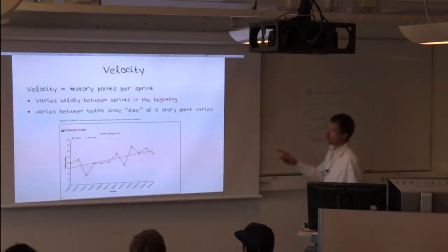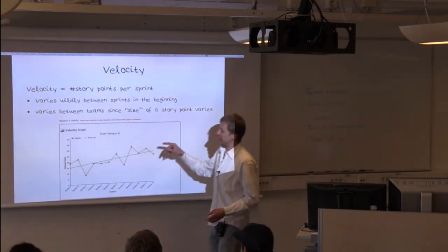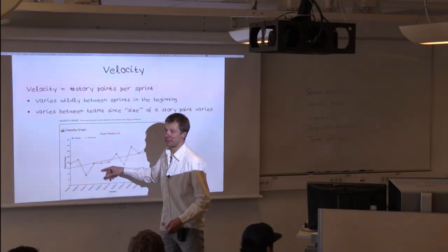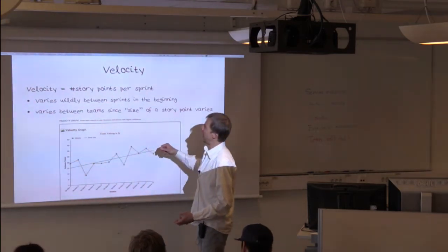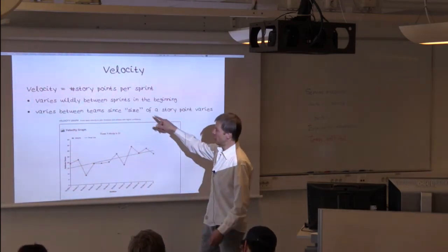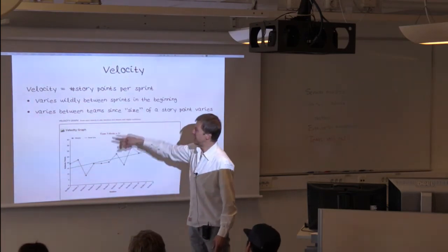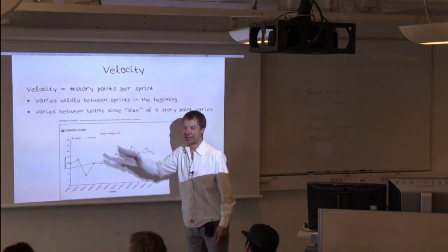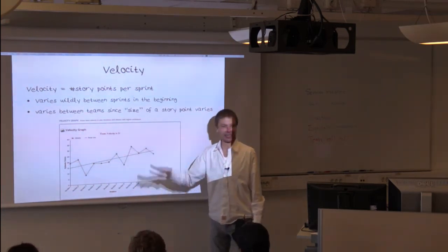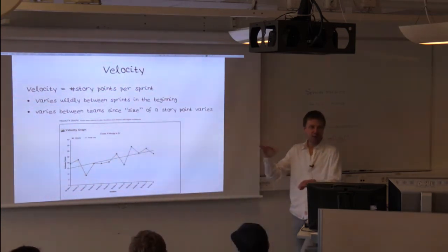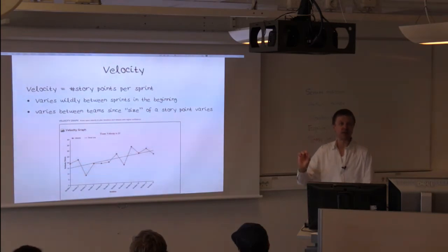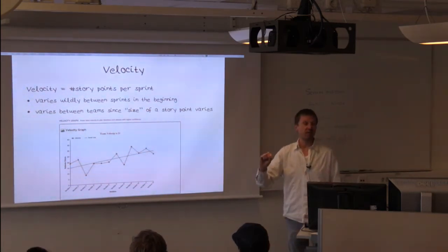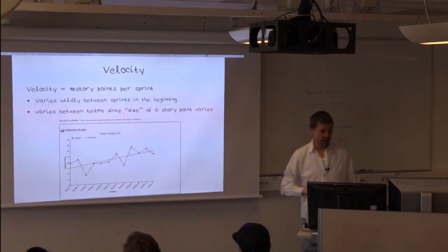And it's going to look like this in the beginning for you, because, yeah, just the way it is. And also, as I pointed out before, the numbers here are going to vary from team to team, because you have a different yardstick, right? Starting from different points. It's all relative to something that you pick as a team, and another team picks something completely different to relate things to. You cannot compare teams here.